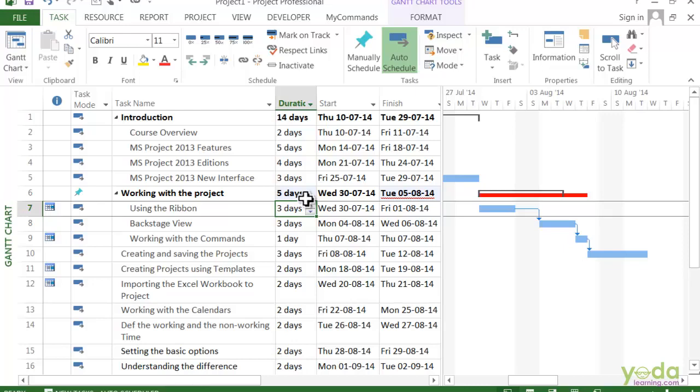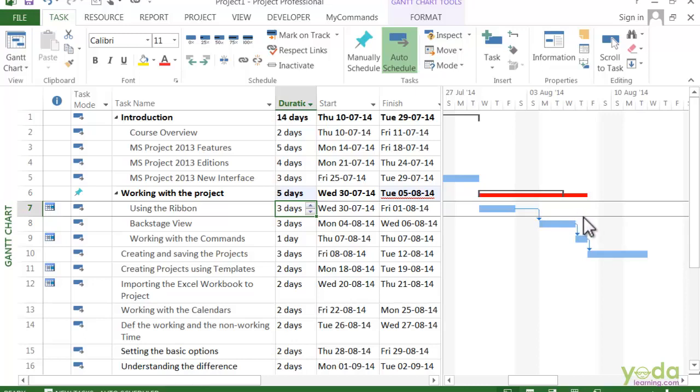Now the black color bracket shows 5 working days, but the other task bar still shows the duration of the subtasks set to 7 days. And because that bar is longer than what you got, it turns red to show you that you don't have enough time. You can also insert a brand new summary task.